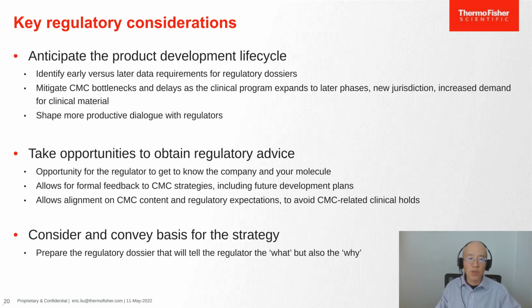Regulators have mechanisms to meet with sponsors in advance of a first-in-human trial submission. So why should you do it? One, regulators can get to know you, your company, and your molecule. Two, it's an opportunity to gain formal feedback on CMC strategies and future development plans, while benefiting from the regulator's knowledge, expertise regarding regulations, and experience based on other similar products, which may be able to help identify and avoid unnecessary development studies. Three, it can allow for alignment on content and expectations to avoid CMC clinical holds and costly delays to reach certain milestones.